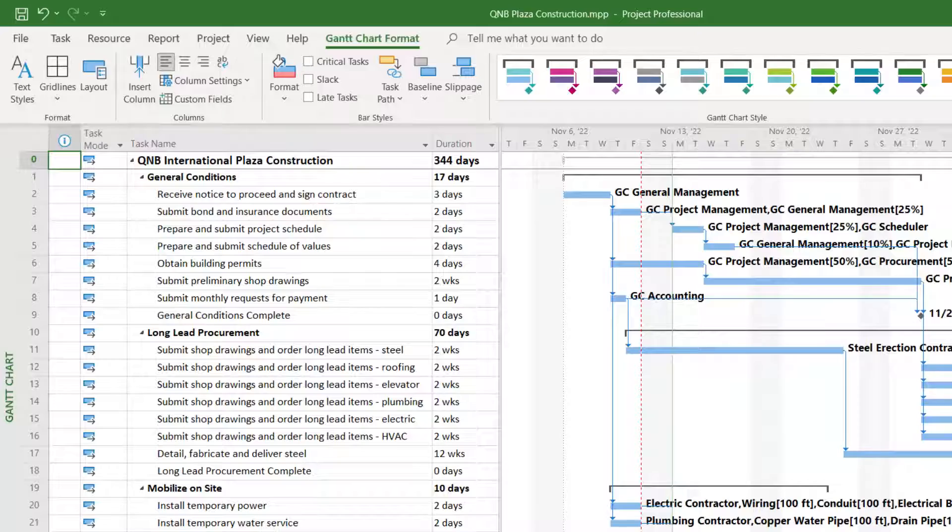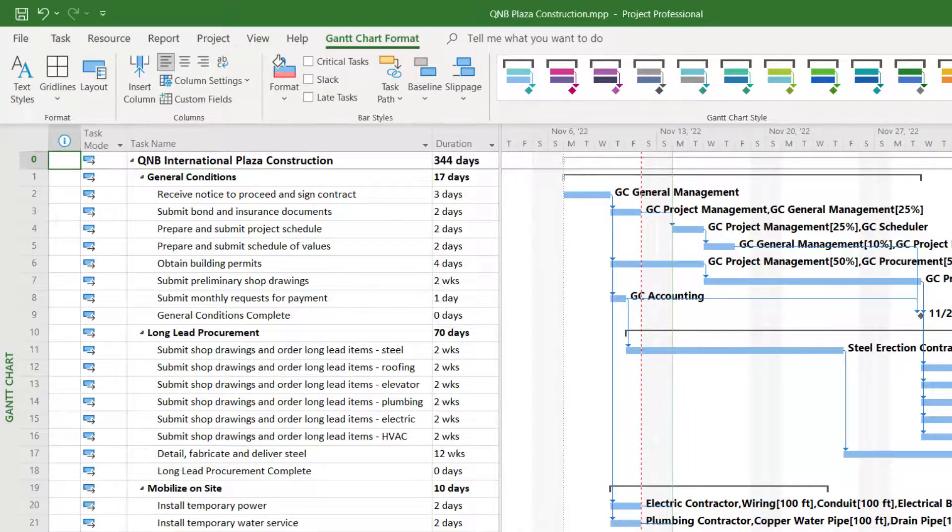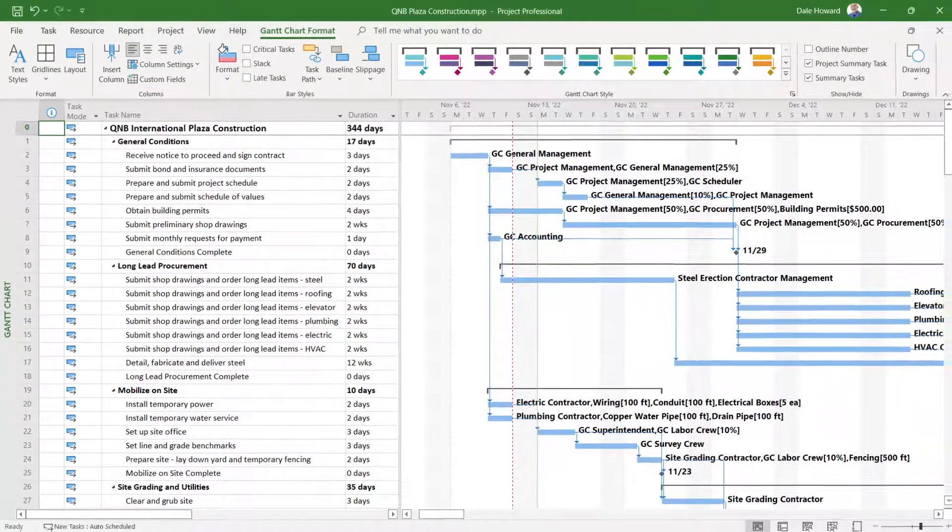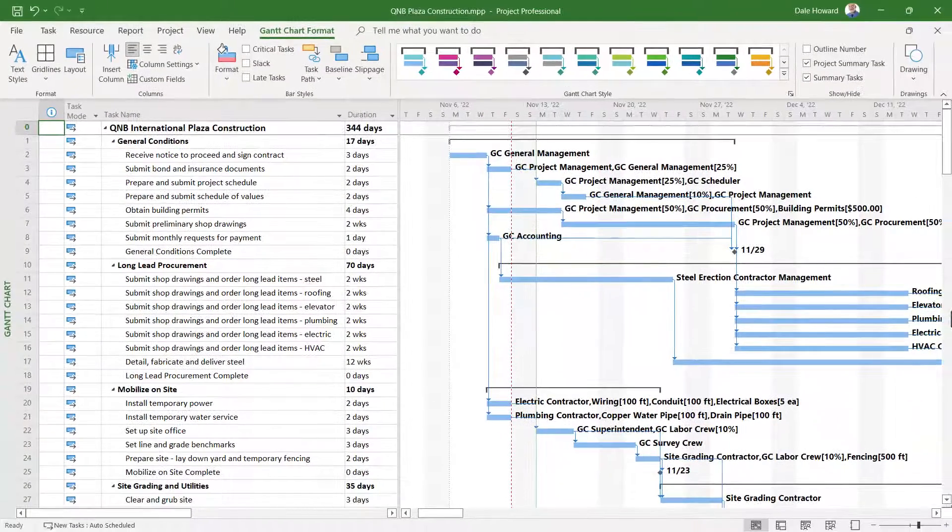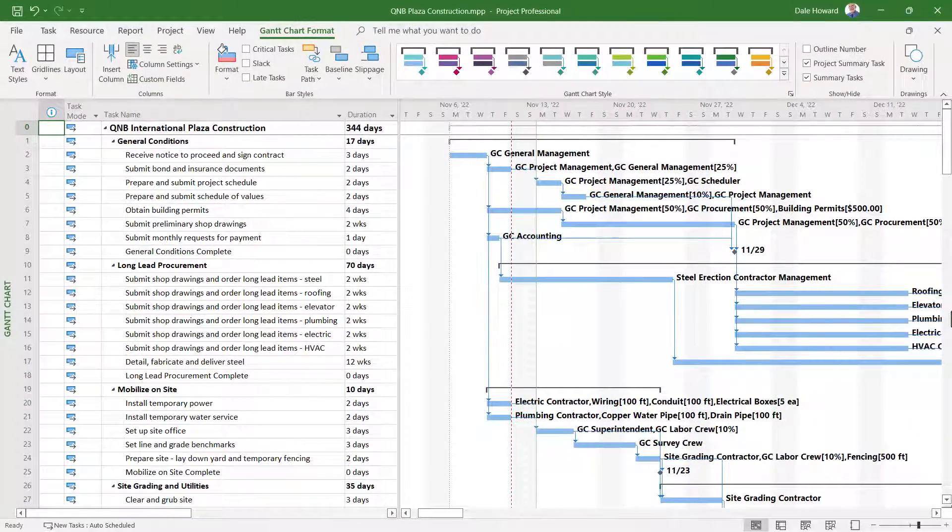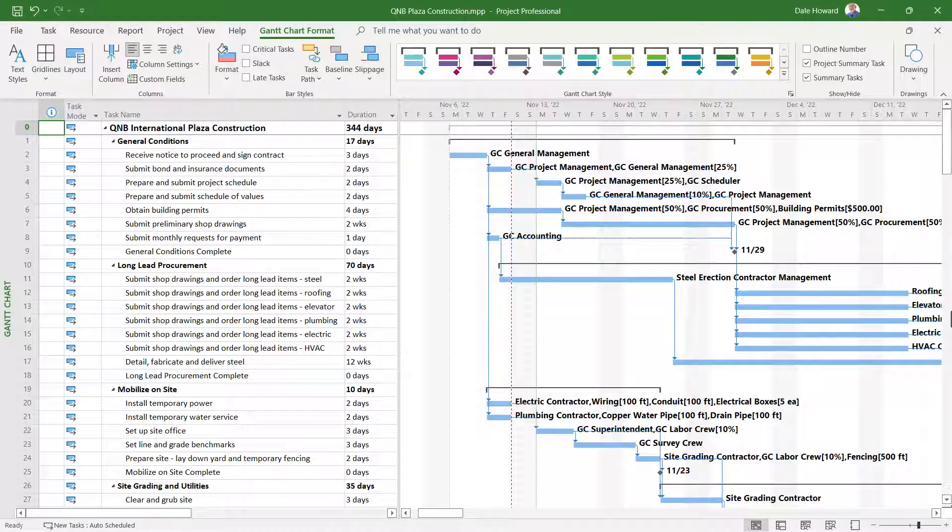Why do we need to do this? This is a visual reminder to us to be sure and specify the status date each week in our projects.